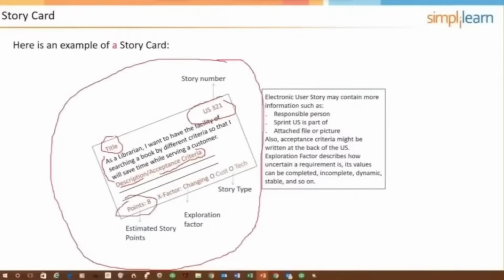It could be ideal days or story points. As I mentioned, most teams do story points. That's more likely what you'll be tested on as opposed to ideal days. But we'll cover both so you understand the differences. It's not listed here, but there's probably going to be a value point assignment. This is where the product owner determines in a relative way the value of the stories.